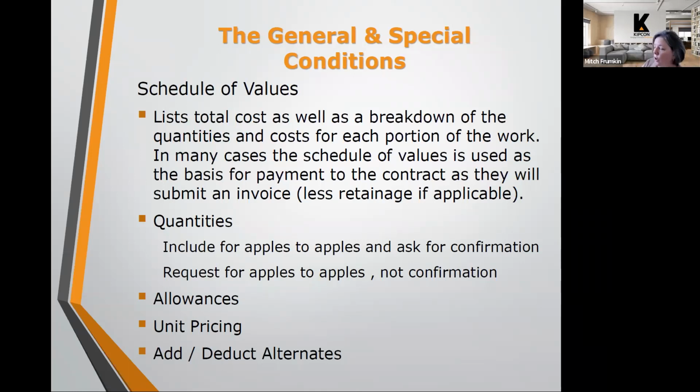So let me elaborate on that a little bit. Base costs are for the pricing for items that you absolutely need to get done during a project. So just for example, in terms of a roadway project, you have to mill the surface of that roadway. You have to put new asphalt back onto that roadway.